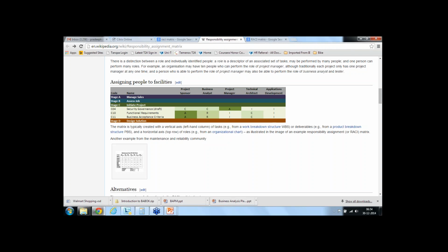At a very high level, you need to have information on what point they are making the comment on, because you need to know in which part of the document they are referring to. So you need to have some reference keys, and it could be a paragraph reference or topic reference, and you also need some kind of line information on what particular line they are making the comment. And then you also need an information column for providing the comment, what the comment is for that particular section or particular line.